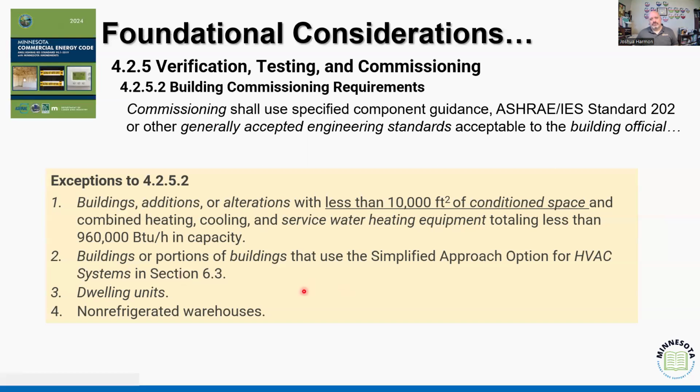exceptions to building commissioning. Now remember, commissioning can follow either one of the ASHRAE IES standards or generally accepted engineering standards acceptable to the building official. So again, that's part of that. It's hard for me to accept something that's never explained or given to me at the beginning of the process, right? But when we think about things that are outside of the process, remember, we're trying to identify and think about this holistically.